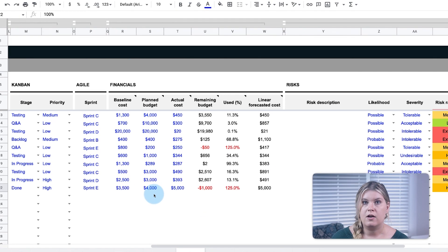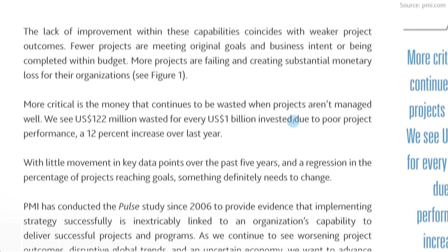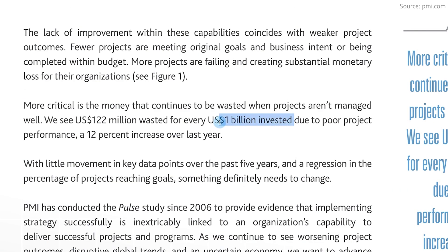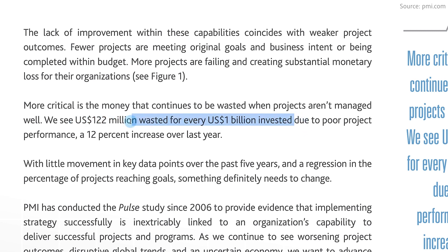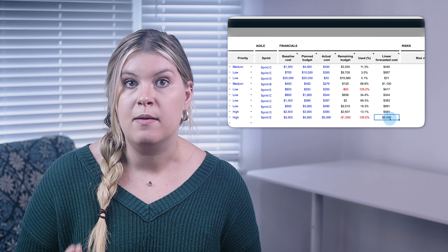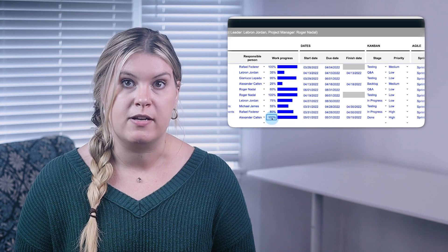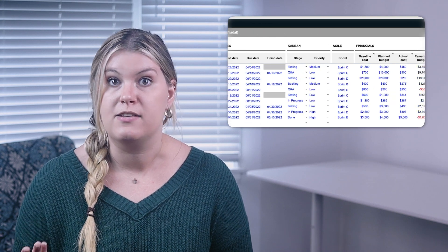The financial data for all tasks are summed to define the overall project budget. These fields are meant to be updated in real time as the project progresses. For every $1 billion invested in the United States, $122 million was wasted due to lacking project performance, so make sure to keep your task list up to date so your overall project budget is up to date too.